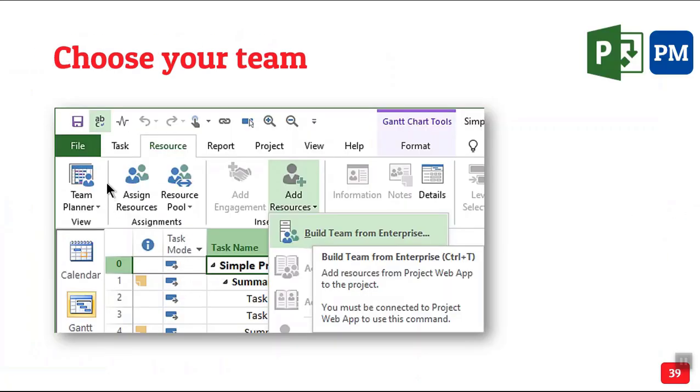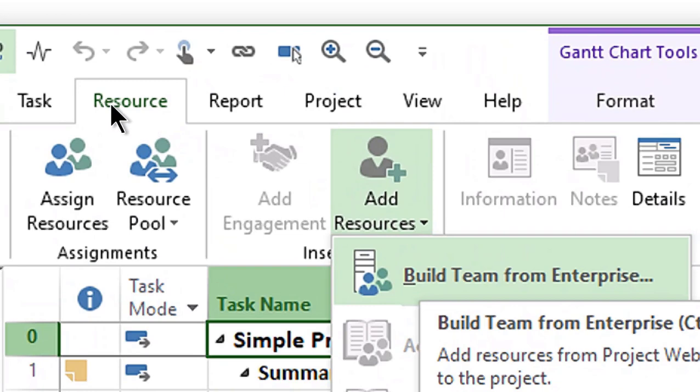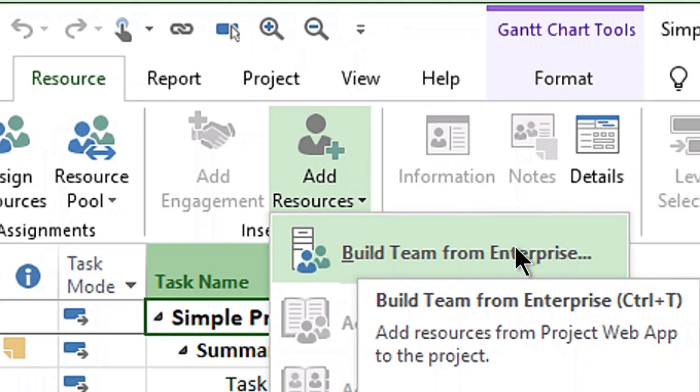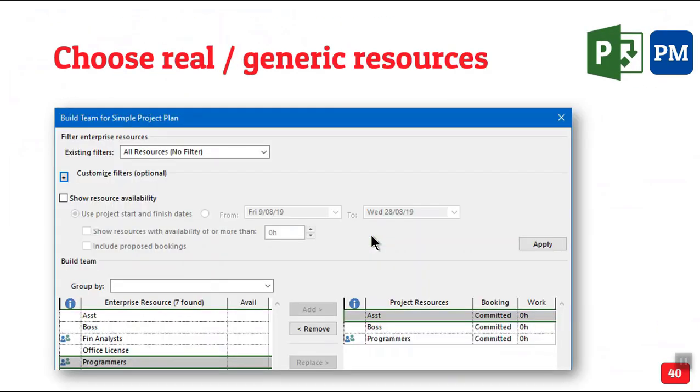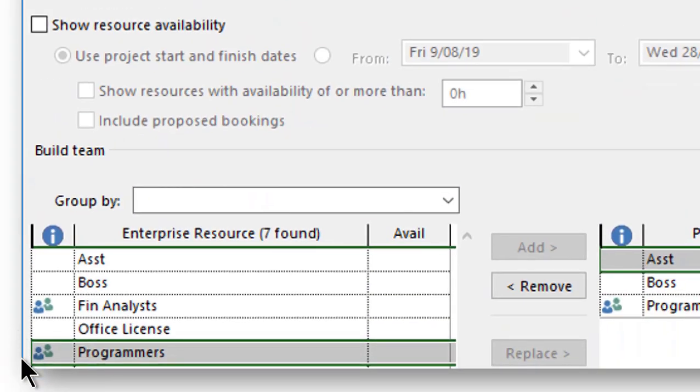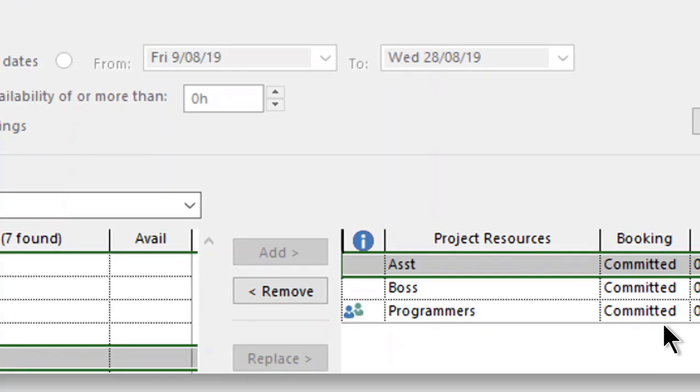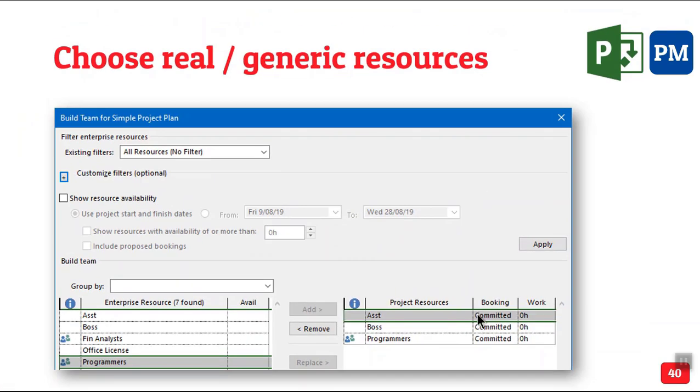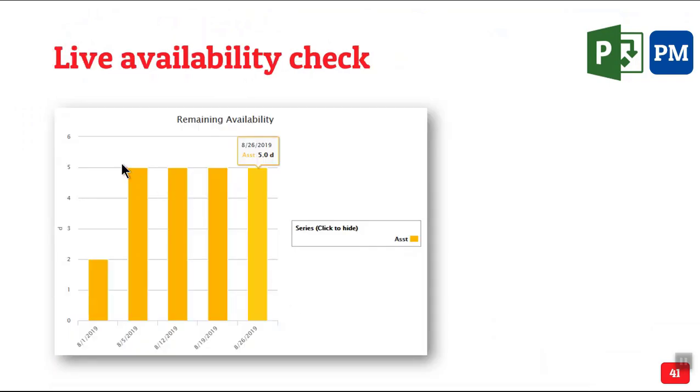So how do I do that? So now I'm back to desktop, the same project, project manager is handling. So in the resource tab, there is add resources and build team from enterprise means take the centralized resource pool. Having done that, what do you do? On the left side, we have all the available people and on the right side, you choose what you want to include. We are actually building a team for this project. You can include external vendors as well. Now at this stage, if I want to know, this is a very important resource. Is this person available? I can see live availability online for every resource. There's a graph and there are multiple views of this.